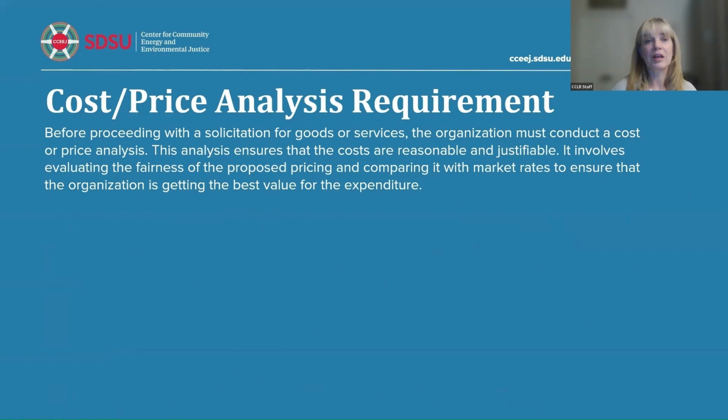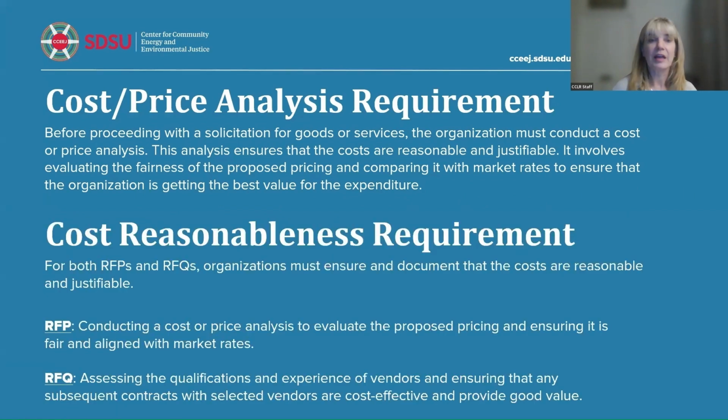So very important. Cost price analysis requirement, and then cost reasonableness requirement. We talked a little bit about this, but the cost price analysis requirement is a must with federal awards. Before proceeding with a solicitation, organizations, cities, municipalities, the grantee must conduct a cost or price analysis. Okay, this ensures that costs are reasonable and justifiable. It involves evaluating the fairness of the proposed pricing and comparing it with market rates to ensure that the organization is getting the best value for the expenditure. Okay.